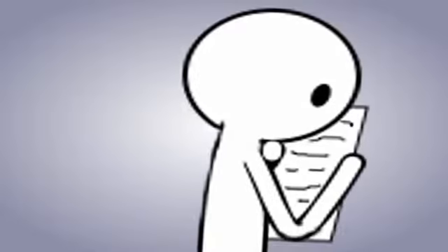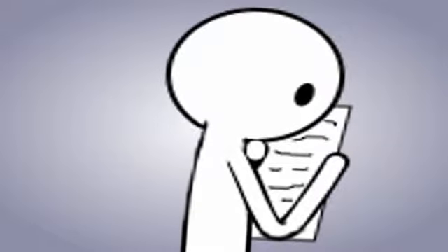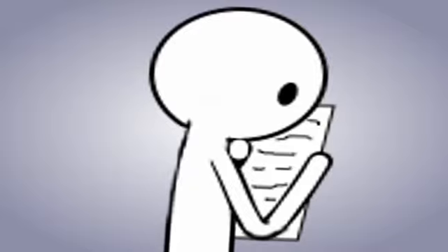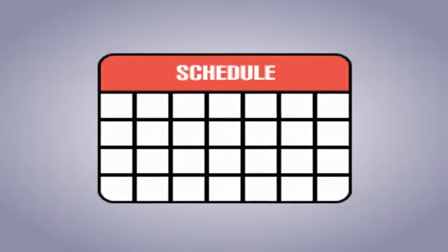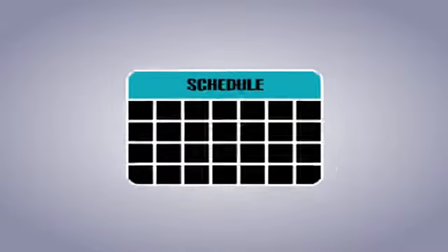The main goal of defining activities is to ensure that the project team completely understands all the work that must be completed as a part of the project scope so that the team can start scheduling the work. The activity list and attributes should be reviewed before moving on to the next step. If this is not done, it could produce an unrealistic schedule and lead to unacceptable results.